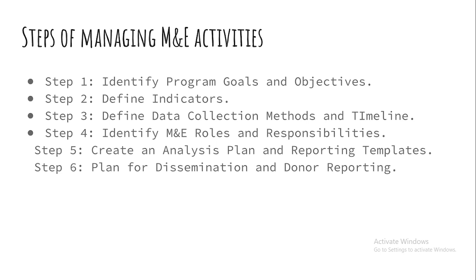Step number two: define your indicators. If you set a goal, objective, or outcome for the project, then you must define your indicator. For example, if I'm running a schools project and the objective is to have 40 schools with energy-saving cooking stoves to promote energy conservation, then the indicator would be: 40 energy-saving stoves installed in 40 schools.